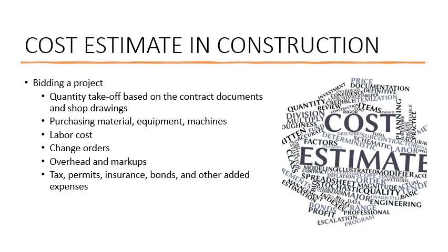Cost estimate is one of the first steps in any project, and it starts at the bidding phase. Regardless of the winning or losing the bid, we need to calculate the project cost to the best of our knowledge. And we know that typically the lowest bidder wins the project, so it is vital to make sure that we predict all the expenses and also that we add our margin to keep everyone happy, the owner, the architect, subs, and most importantly ourselves.